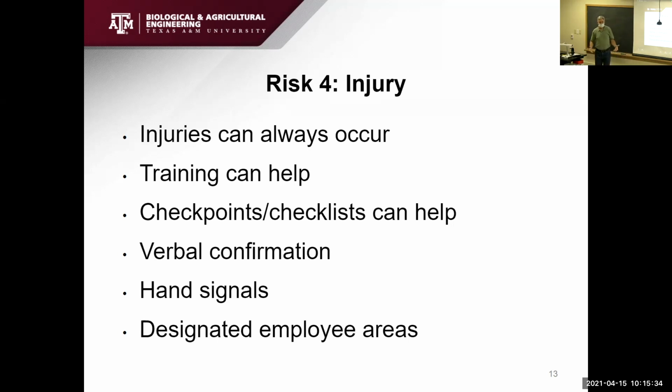Are you talking about him just stumbling over the grate as he goes in there? No, you're talking about under truck is an issue. So identify the risk, and then I would probably have a sub bullet here, mitigation. Here's how we're going to mitigate this risk, because these other bullets are not part of the risk. They're part of the mitigation: training, checklists, verbal compromise. All these mitigation steps, you need to highlight that instead of just blending it all together as risk, because this is the risk, these are your mitigation steps.